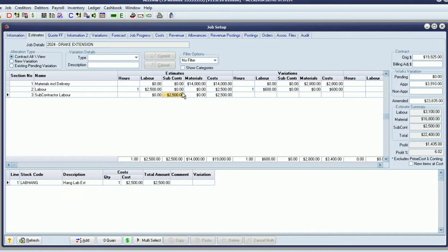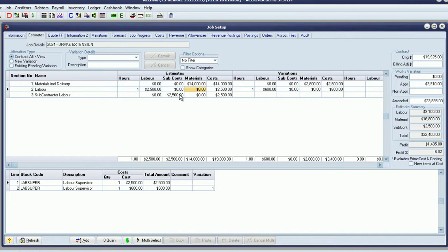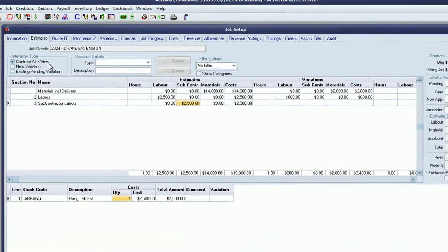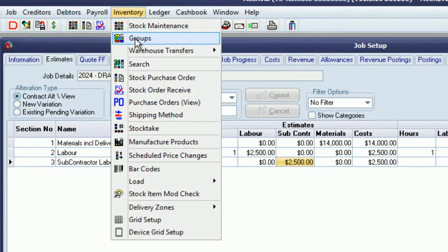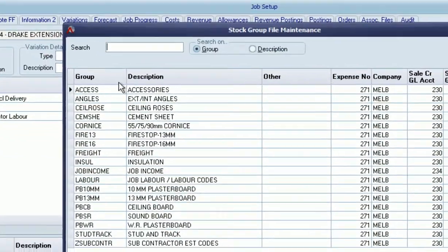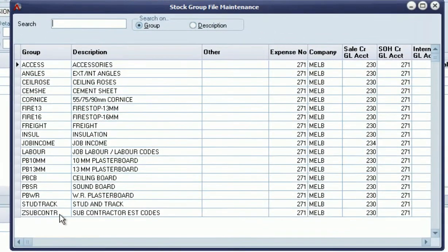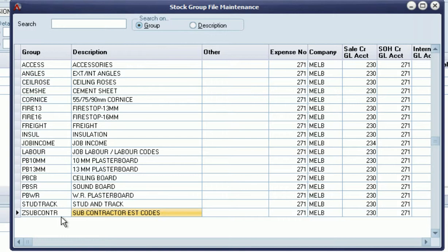whether or not the estimate and actuals is a subcontractor cost versus a normal labor cost from the payroll system or materials cost. We need to distinguish the estimating codes as well as the actuals that come through. That is done through a stock group set up in the system. In this case, we've called it Z_SUBCONTR, and every stock item in that group will be seen as an estimating code that relates to subcontractors.